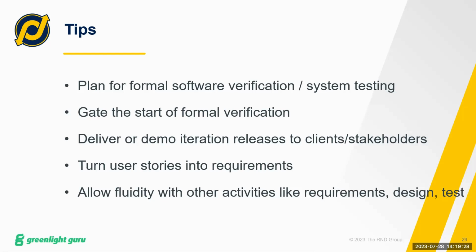You also want to gate the start of your formal verification. By that, I mean that after you finish your implementation, you've code reviewed, and you've verified your individual items, you want to make sure that all your documentation not only is updated, but has also been approved. Have that gate before you start that sprint, or whatever you do for formal verification.